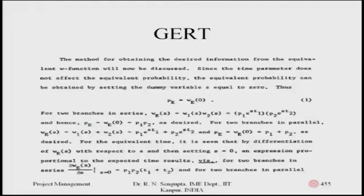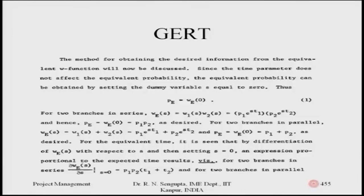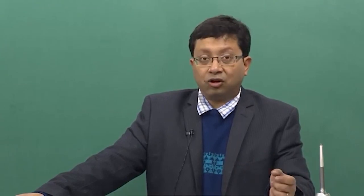The method for obtaining the desired information from the equivalent W function will now be discussed. Since the time parameter does not affect the equivalent probability, the equivalent probability can be obtained by setting the dummy variable S equal to zero. You can then differentiate the function at S equals zero and find out the overall characteristics of that function.